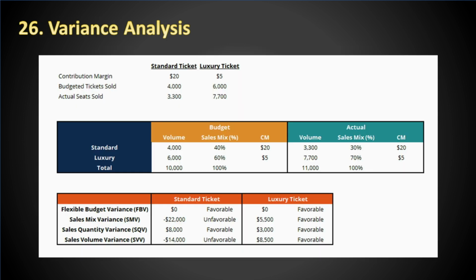Variance analysis. Variance analysis is the quantitative investigation of the difference between actual and planned behavior. This technique is used for determining the cause and degree of difference between the baseline and actual performance and to maintain control over a project. Cost and schedule variances are the most frequently analyzed measurements.